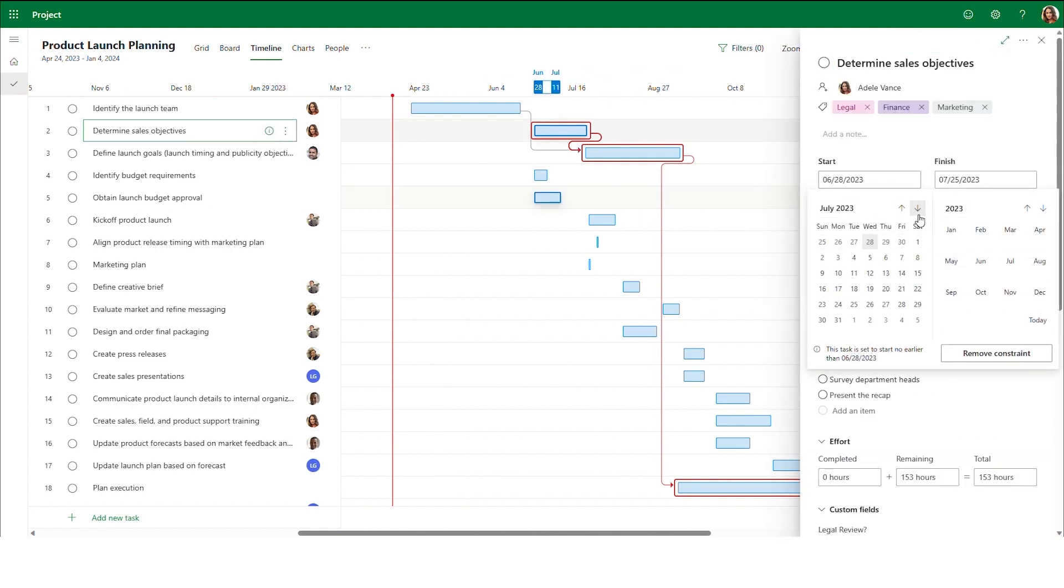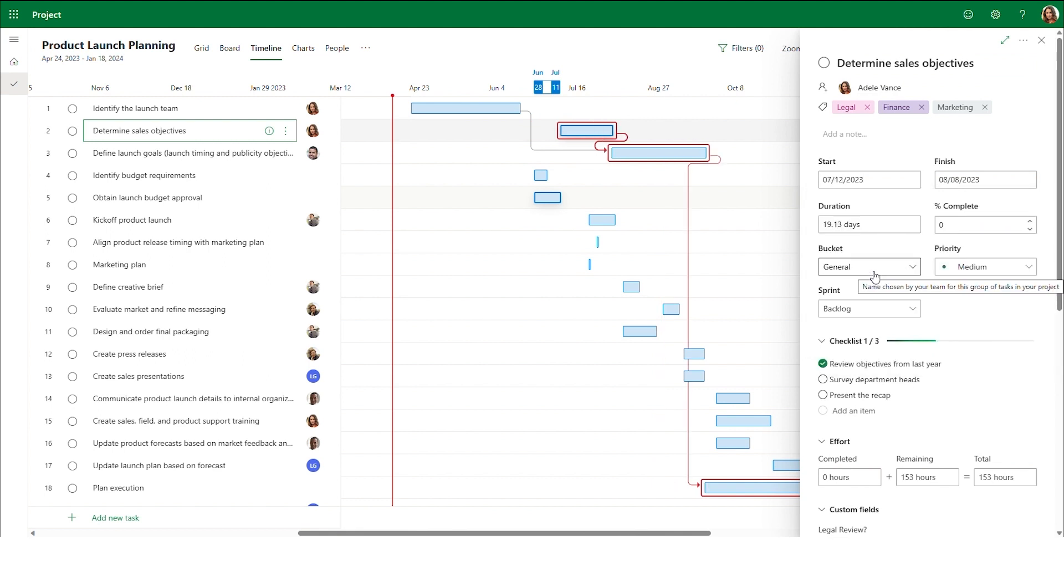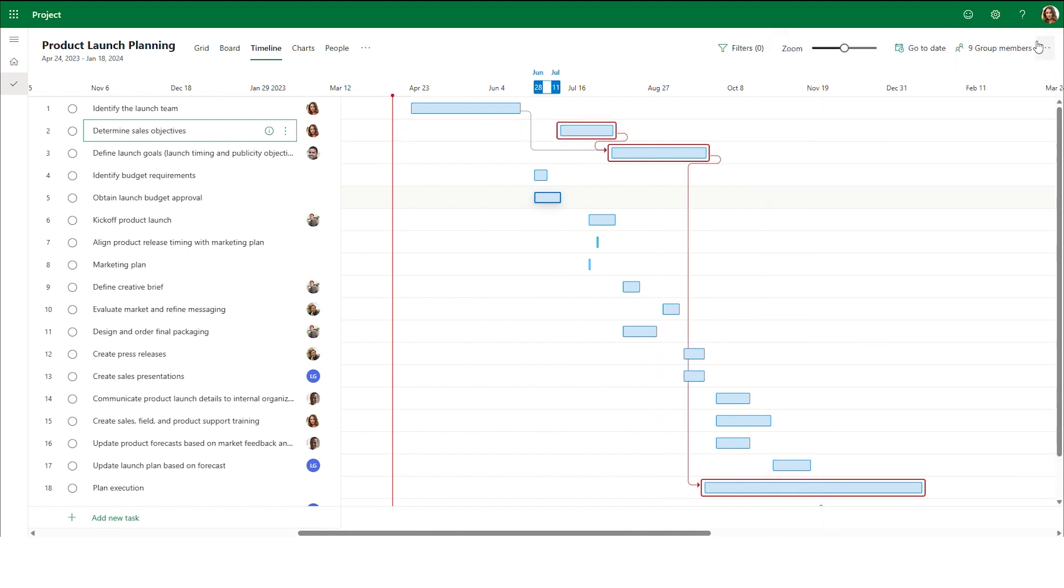And if a task's start or end dates are ever changed, Project will automatically update all the dependent task execution dates so you can stay on top of your project's timelines.